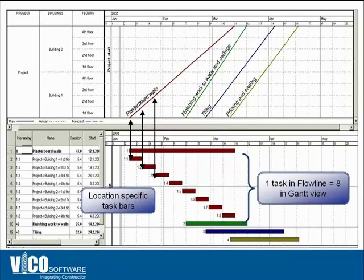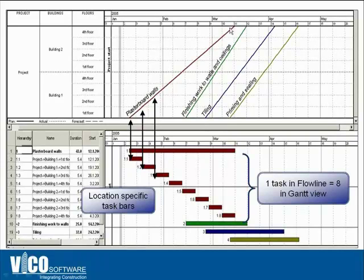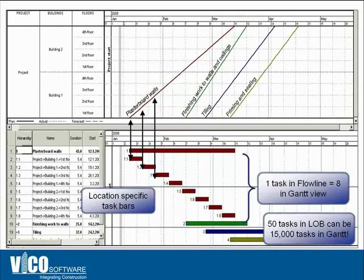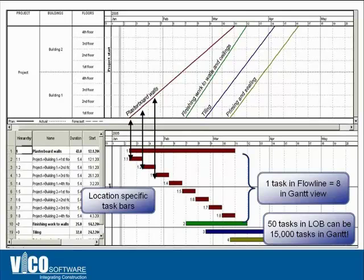With this technology you also reduce the number of links embedded in the schedule, because the location sequence logic is automatically generated by the Flowline view. The continuity of locations is ensured by having a continuous, unbroken line, and the logic is automatically handled by the program. You only need to manage predecessor and successor links, which reduces the number of links by an order of magnitude and helps you re-sequence the schedule as many times as needed during pre-construction.